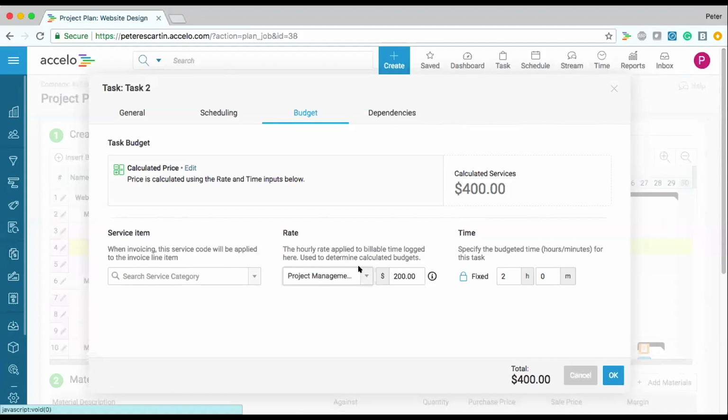Because if you have something set to staff rates like that, then whatever time you log, let's say you log an hour, Lainey could log an hour at $150 an hour because that's her staff rate, where my default billable rate might be 100. So I log an hour and then I've just generated $100 worth of value on the same exact task. So staff rates are useful if you're basing your task or your ticket on time and materials and not a set rate.